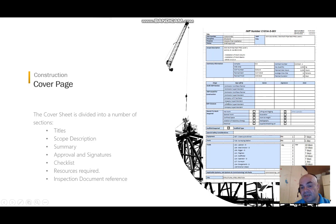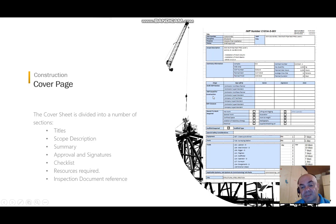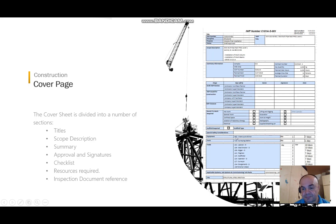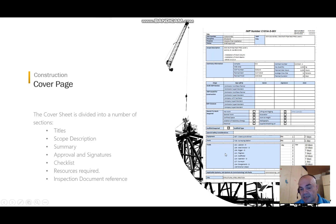We can also see the signature section — where people sign or approve whether the IWP is draft, issued for construction, or completed. For issued-for-construction status you need company approval, because signing means they guarantee that the material and drawings are up to date and latest. There is also a small table showing what permits to work are required and whether scaffolding is needed, plus the resources needed — equipment, special tools, and personnel.